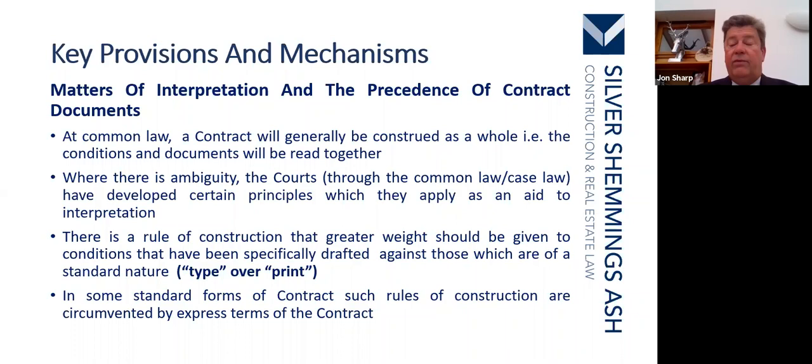Now, of course, that rule is fairly well known to those that draft contracts on a regular basis, and very often in the contract itself, that rule of construction will be excluded, and there will be a clause that says all of the terms of this contract are to be read together, and no one clause should be given any more weight than any other.